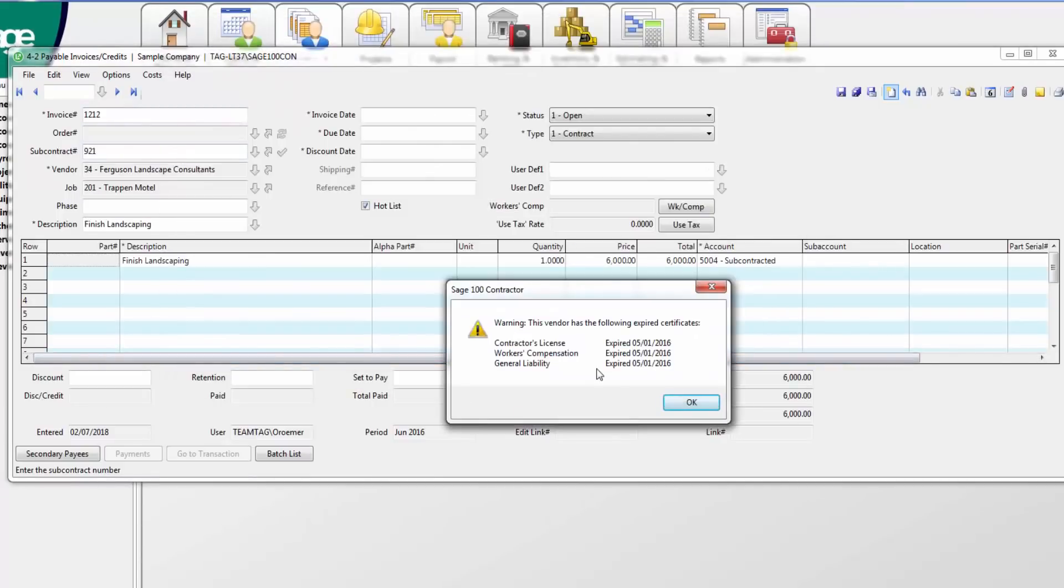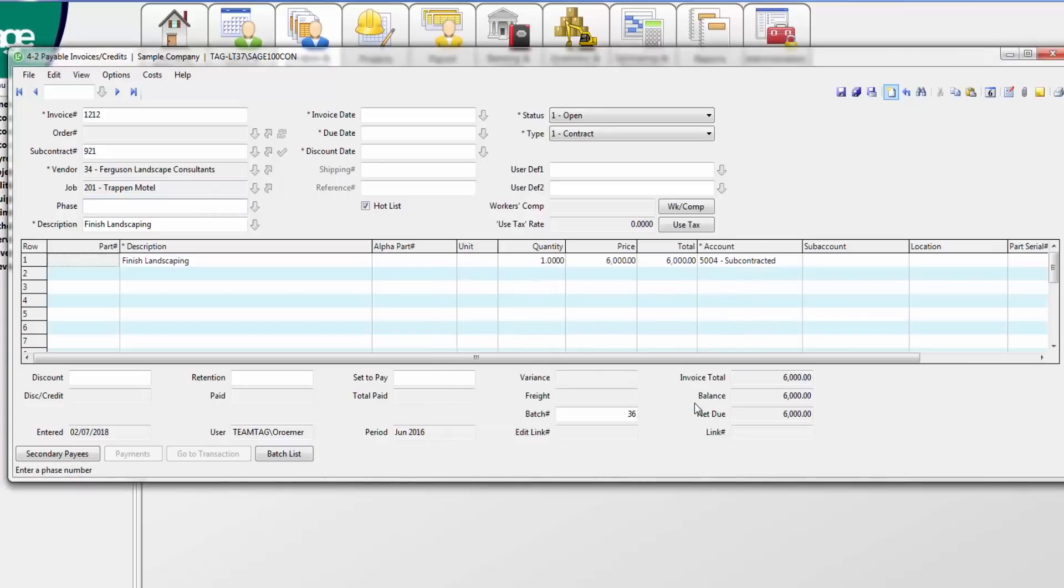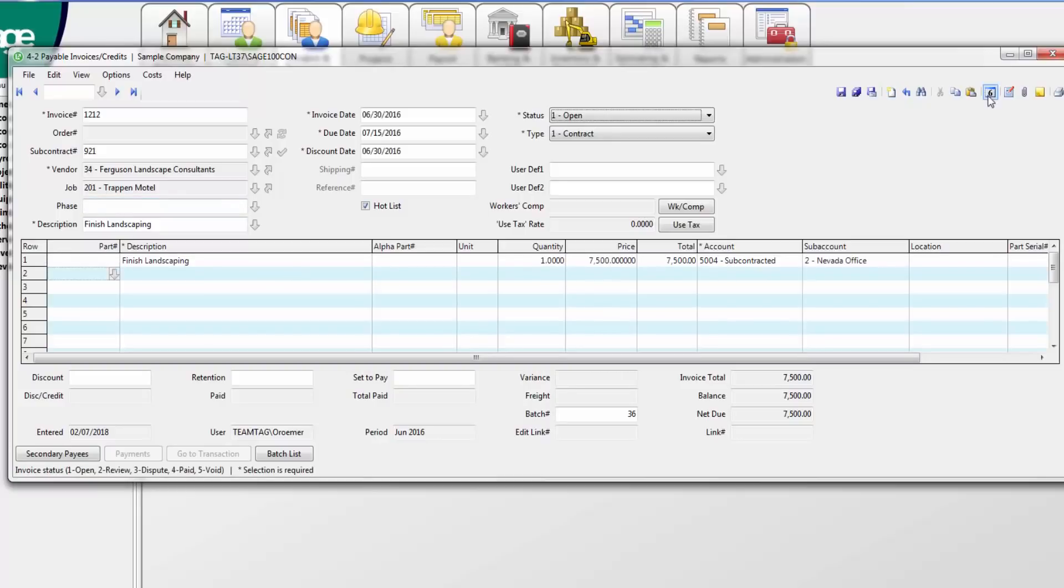It notifies me that the vendor's insurance is expired. This way, I can hold payment if necessary to get revised insurance. It also pulls up the subcontract agreement details. Here I can enter in the appropriate information. I can also choose what accounting period I want this invoice to post in.